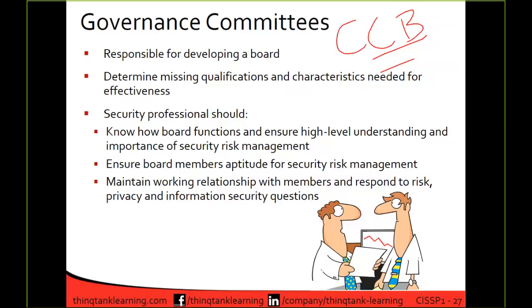So the purpose of a CCB, which is essentially a governance committee, is that all the key stakeholders from those different silos get together and say, you're going to make this change. Okay, this is what we have to do. No, you can't do that because it'll affect this, and so on. That's a change control board. And Bob was right, it's also about identifying new policies, procedures, guidelines, etc. That's what a governance committee is, right?